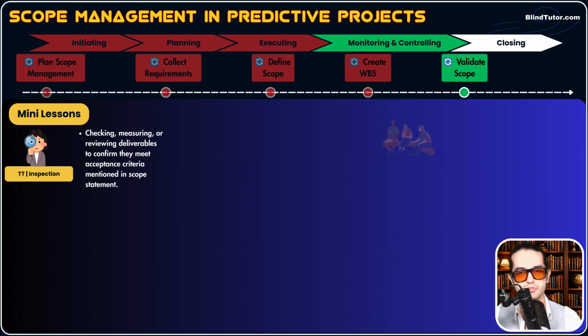They go to different rooms, different labs, and actually see that deliverable, touch that deliverable, test that deliverable. If it was a mobile app project, the customer or client logs in, creates an account, does a transaction, okay? Physically tests. This is step 2 of inspection. Inspection means testing, checking if it works or not, if it meets our expectations or not.